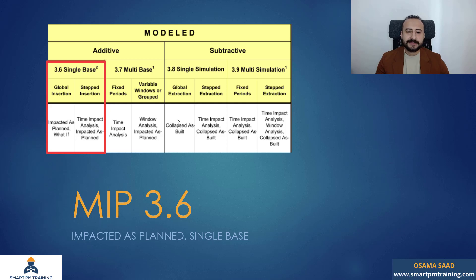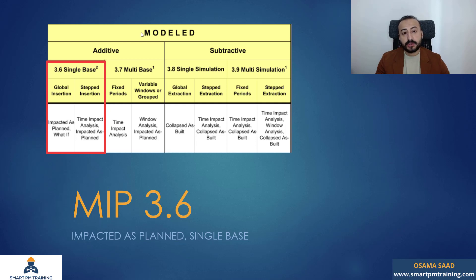Hi and welcome back. In this video I want to talk about the MIP 3.6 Impacted As-Planned single base. It is a modeled delay analysis method. It's additive because we are adding new activities to model the impact. We will talk first about the single base — we have global insertion and stepped insertion.